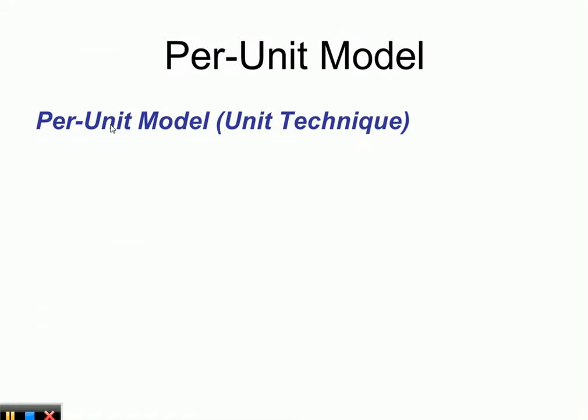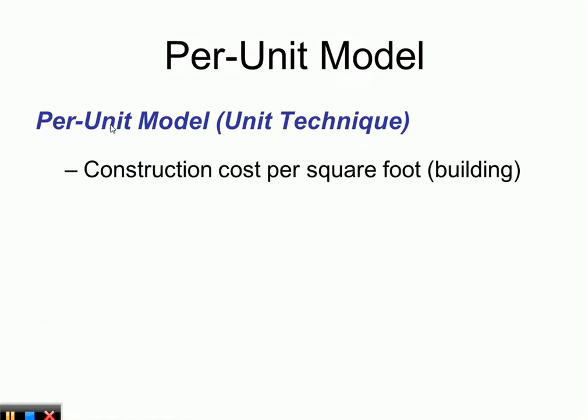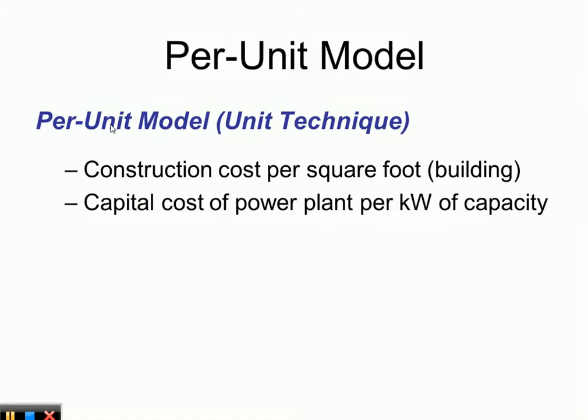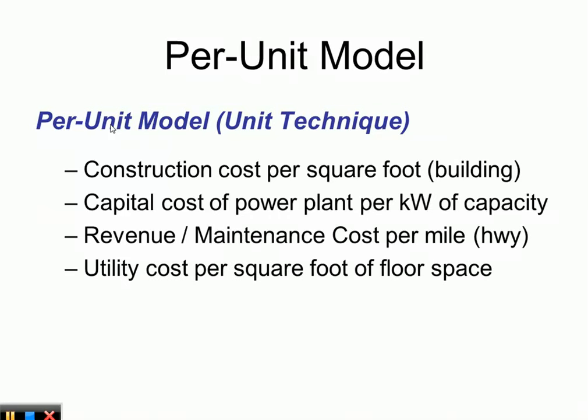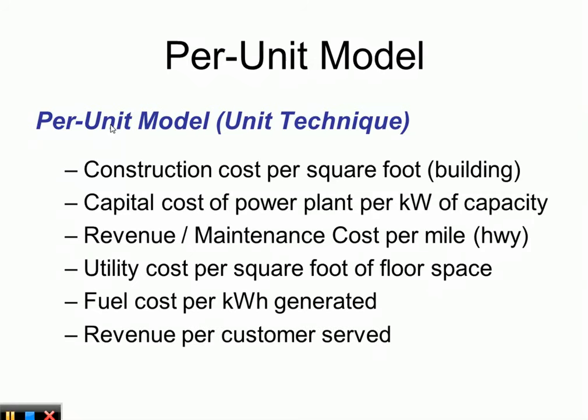The per-unit model, also known as the unit technique, is used in construction to determine construction costs per square foot. It also applies to capital cost of a power plant per kilowatt capacity, revenue and maintenance cost per mile of highway, utility cost per square foot of floor space, fuel cost per kilowatt generated, and revenue per customer served.